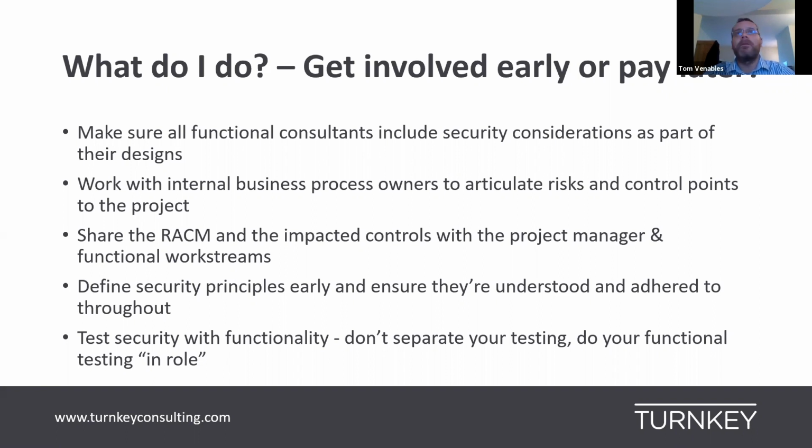So how to avoid it? Get involved early or pay the price later is the theme. Make sure your functional consultants and your business process owners internally include the security considerations as part of their designs. Expose it, raise that priority with whoever your partner is that you're implementing with. Share the risk and controls matrices and the impacted controls per business process with the project manager and the functional work streams. Communicate that you have key priorities that you can't breach, and make sure that they incorporate those into the design. As I said, get involved early and ensure that they're understood and adhered to throughout the life cycle of the project and throughout the project team.